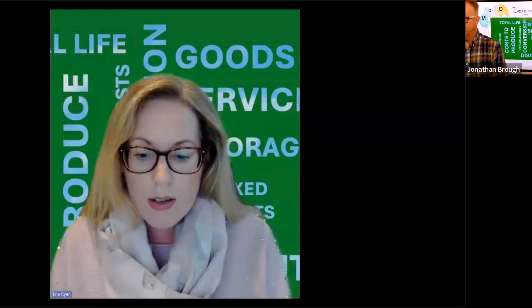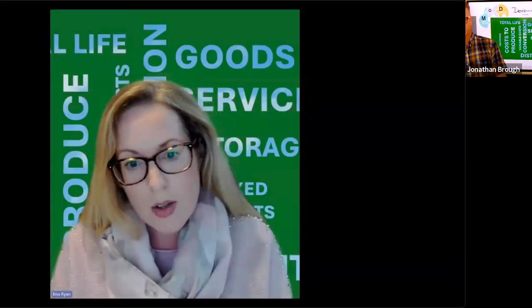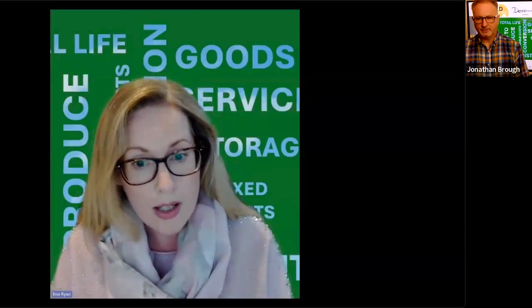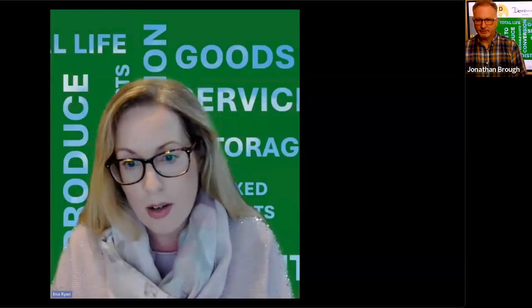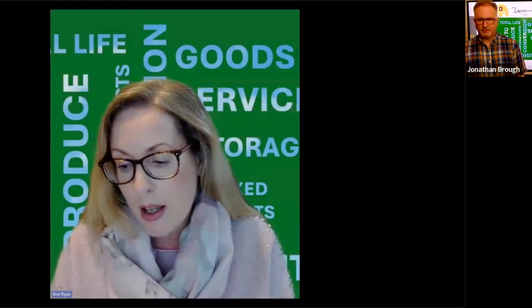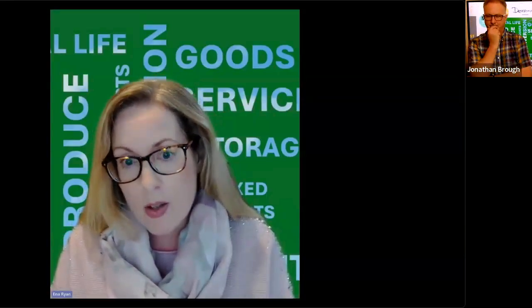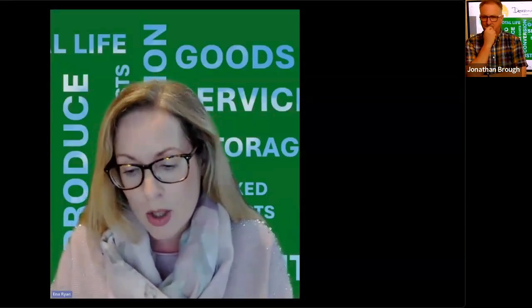So the selection criteria varies depending on if it's a product or a service. If it's a product, typical selection criteria would be commercial terms. So not only price, we look at the payment terms. So working capital is very important for us. So it's not only the price, it's actually the payment terms the supplier can offer us. Also, can they offer a volume rebate? This is also very important. Also, if the price is fixed, or what the price review mechanism is, that's also important. And also if they will offer us open book costing. So it's not only the price when we think about the commercial terms.